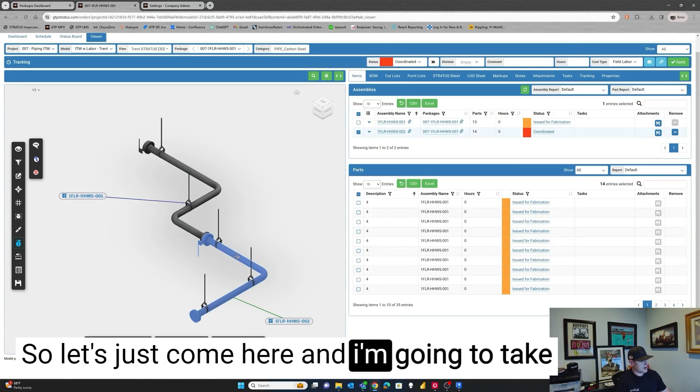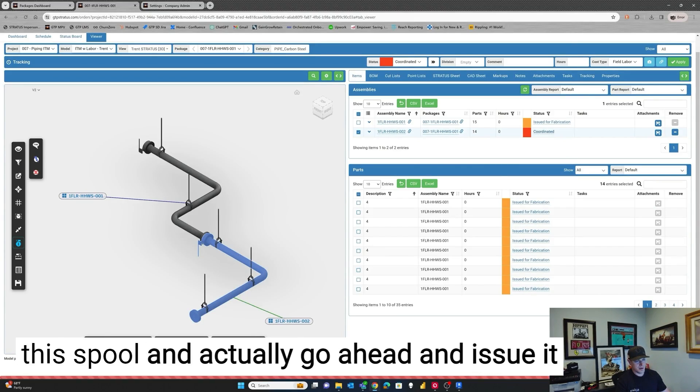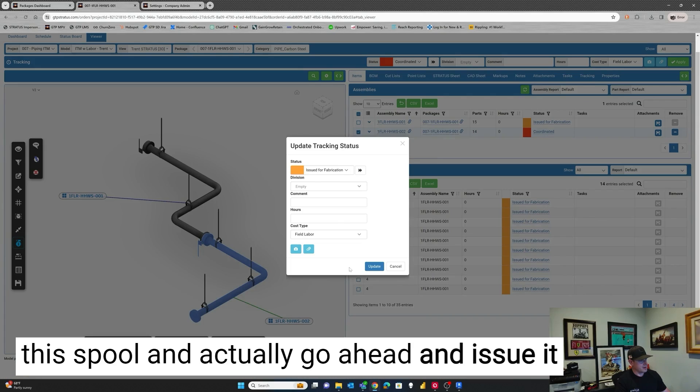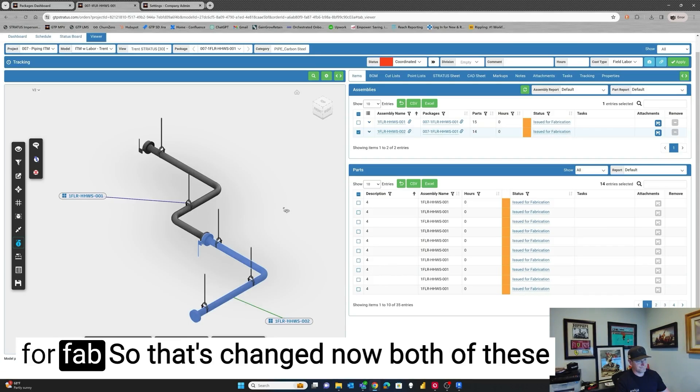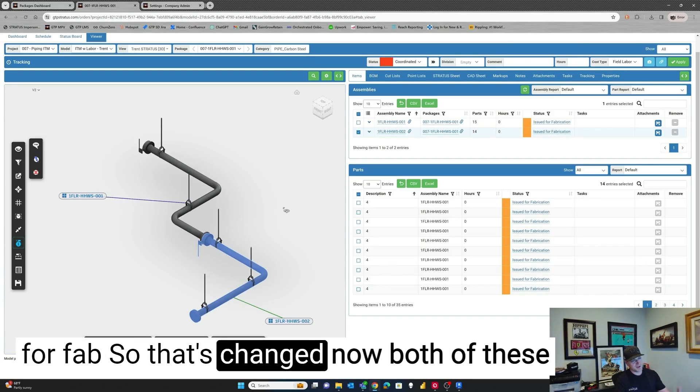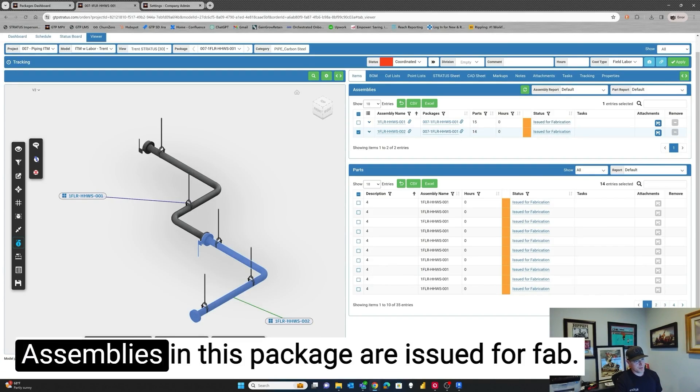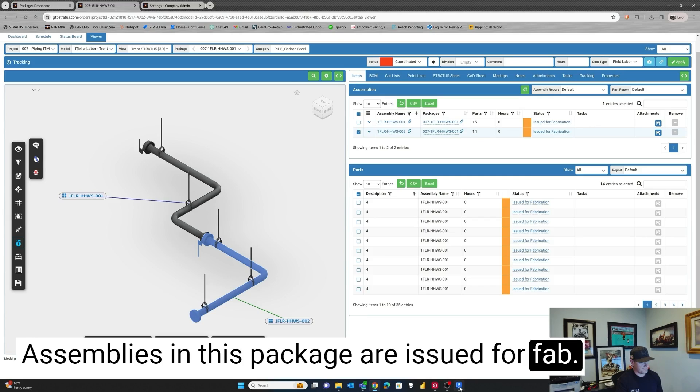So let's just come here and I'm going to take this spool and actually go ahead and issue it for fab. So that's changed. Now both of these assemblies in this package are issued for fab.